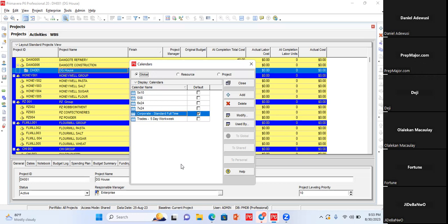Your productivity at the end of the day, most people rate their productivity hours at 6 hours per day for an 8 hour job. So if they really want to monitor your productivity, that's why they will break it down. They will create a resource calendar for you and start monitoring your productivity.